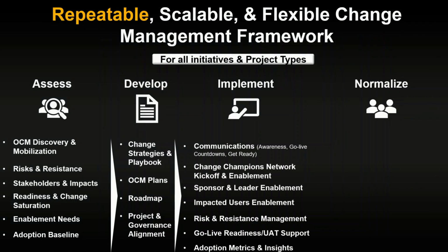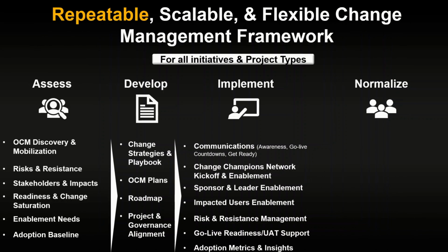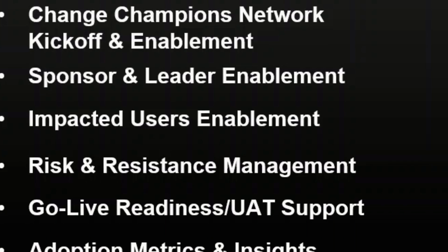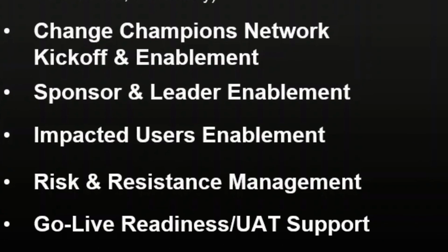You also want to enable impacted users. That involves providing users with training, guides, FAQs, as well as ongoing support. And then resistance management. You also want to ensure that during the implement phase, you are doing your monitoring of resistance and also addressing any resistance that you identify, new resistance or previous resistance that you identified. You want to make sure that those are not coming up after they've been resolved.